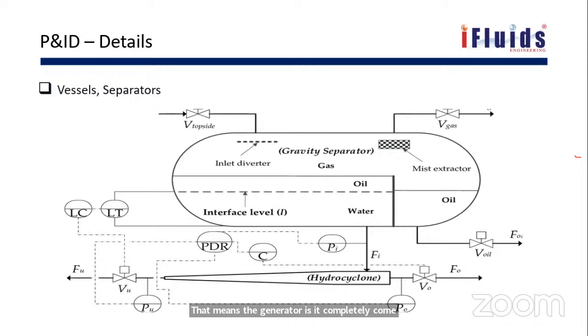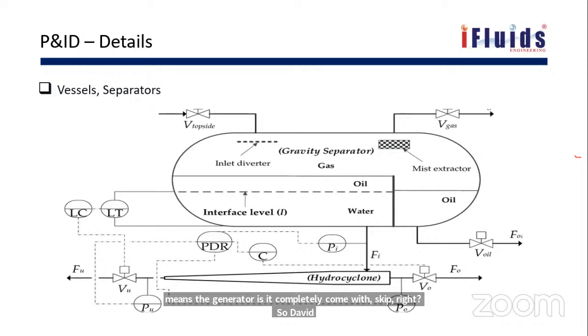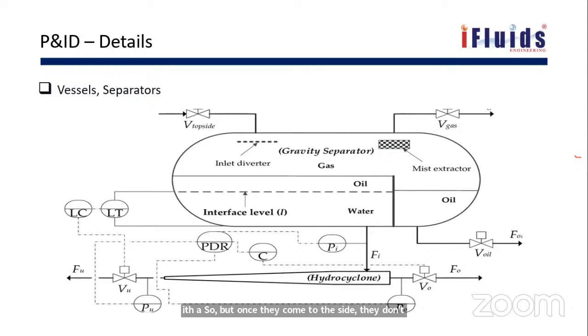This project ran for 2 years, and the 2 years of work was completely wasted. They did not have the space inside the plant, so they needed to go for a new procurement of a separate private party area for it. These things will happen. These are the review steps. This is why it is happening: the review step is not happening. The company says you follow at 30%, you follow at 60%, so that someone doesn't skip it.